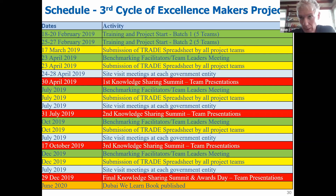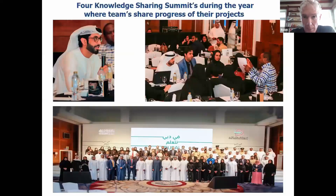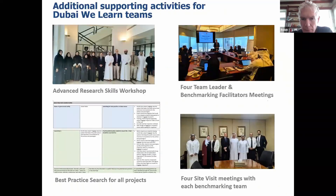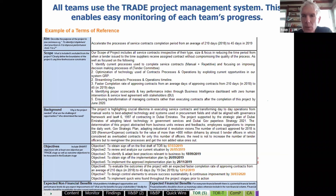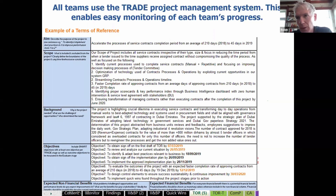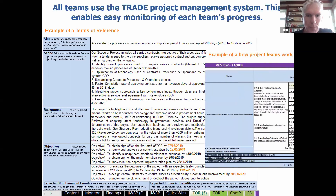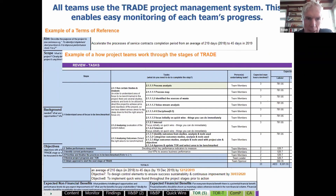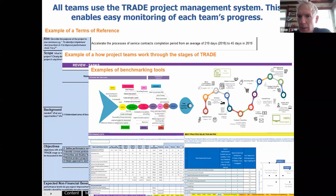Six months after the program ends, we write a book sharing all the case studies from those projects. You can see photographs from the knowledge sharing summits in Dubai. The TRADE project management system uses Excel spreadsheets because everybody's familiar with Excel — there are over 40 different tabs with tools and methods to assist you in a benchmarking project. This includes things like the terms of reference, planning for the review stage, fishbone analysis, process mapping, and best practice selection matrix.